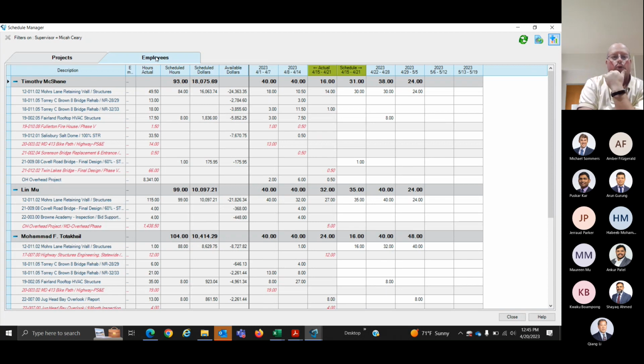So like for here, the red ones are ones in which someone has worked that was never assigned to the project. That could be the way you set up the project, but it also could be that you had someone unanticipated show up. Okay, questions? All right, so is it kind of clear how you can use this for a workflow?